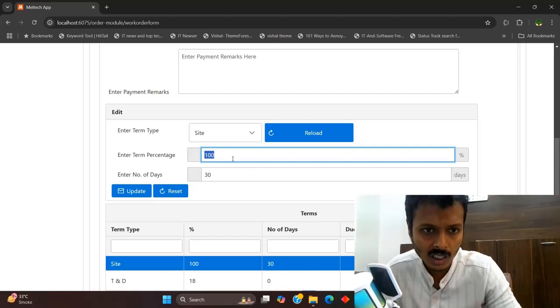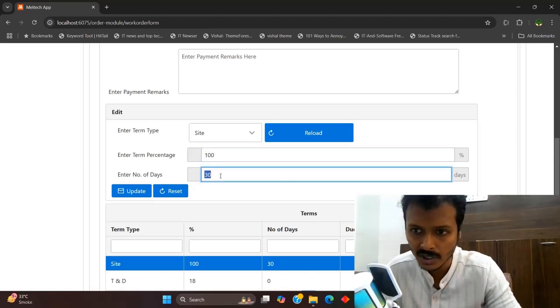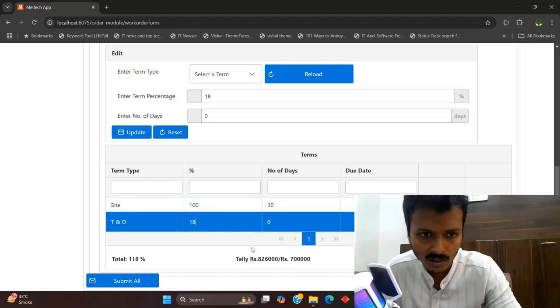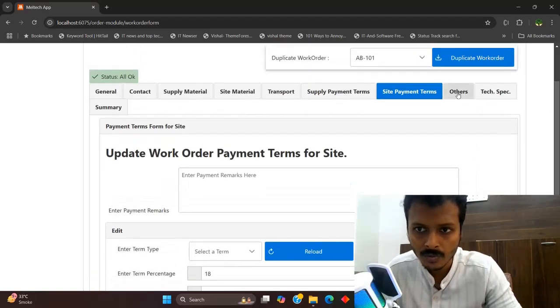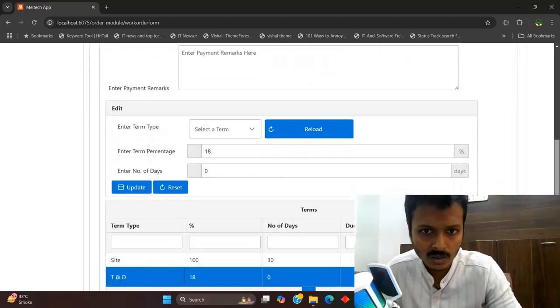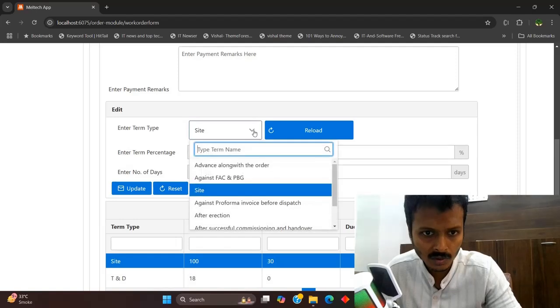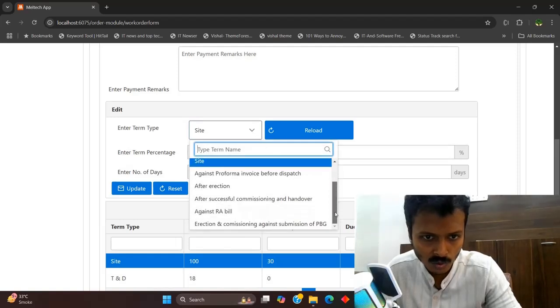Okay. After the 30 days of erection, basically erection of the commissioning of the crane, within the 30 days, the payment has to be done. Again, the taxes are levied on that also, 18%. As you can see, 7 lakh has been charged, and this is the after tax amount. Then you can update those rates here, or you can actually create more of the heads by selecting here.